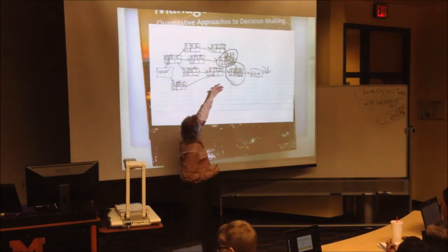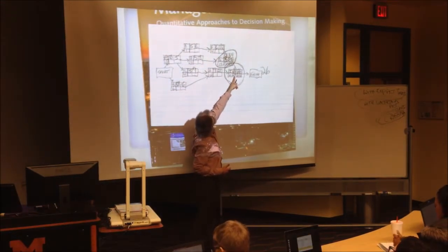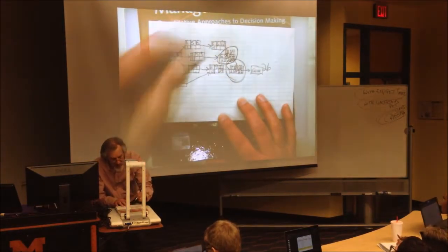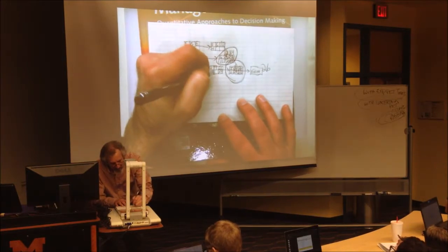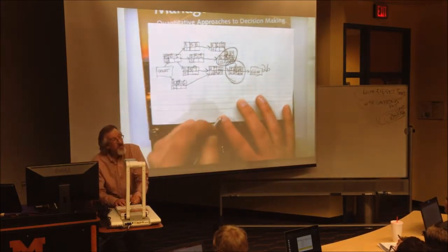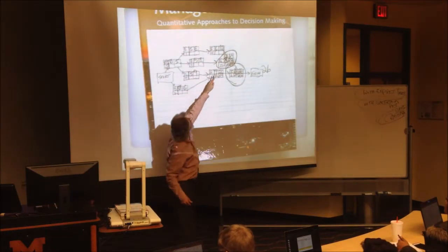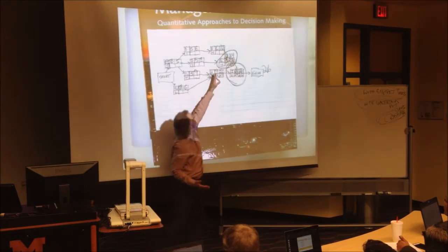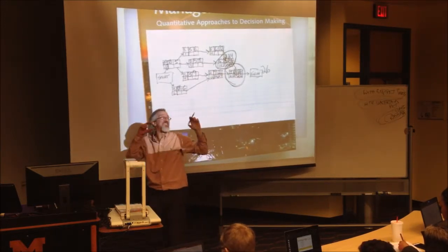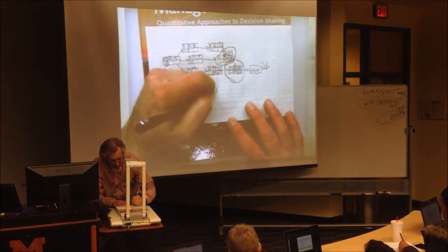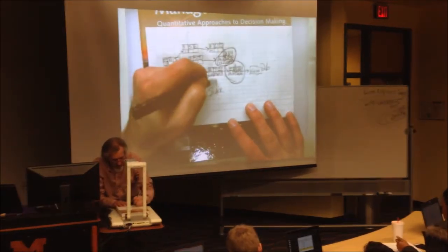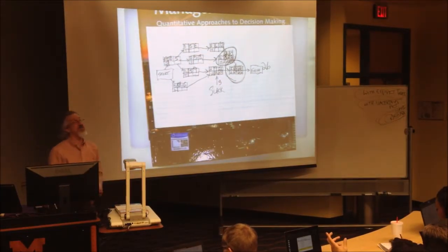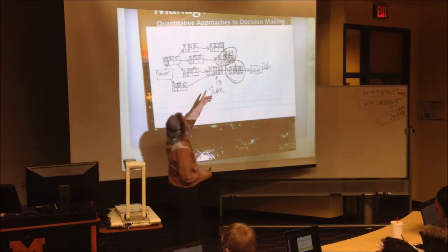H. H only has I after it, is that right? The latest start is 24, so this could finish as late as 24 and not hold up I. Subtract 12, and we're at 12 right here? Yeah. Now look at the starts. It could start on day 9 or it could start on day 12. There's a difference there, and you can use either the starts or the finishes to find that difference, called slack. The slack for H is 3 days.